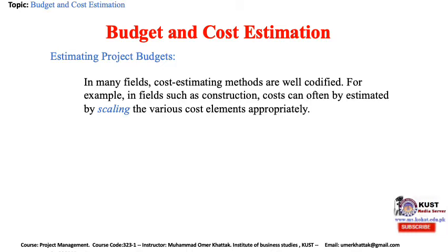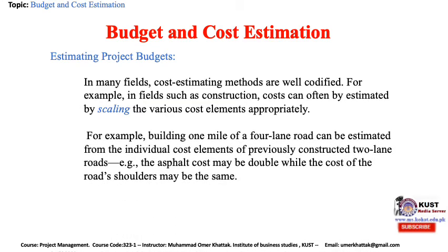In many fields, cost estimation methods are well codified. For example, in construction, costs can be estimated by scaling the various cost elements appropriately. Building one mile of four-lane road can be estimated from the individual cost elements of previously constructed two-lane roads — for example, the asphalt cost may be double while the cost of the road's shoulders may be the same.